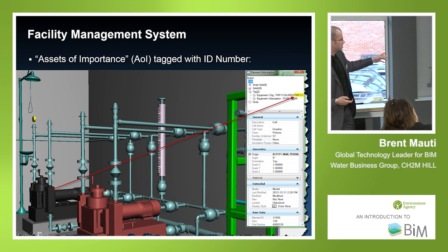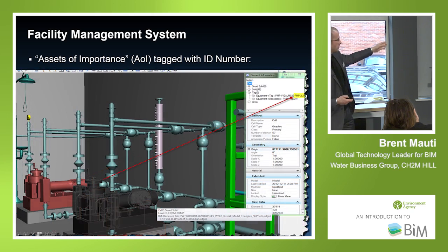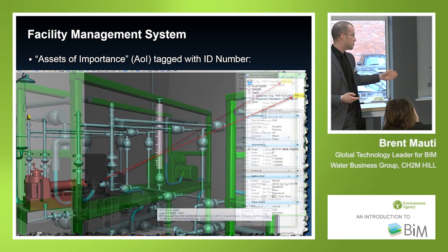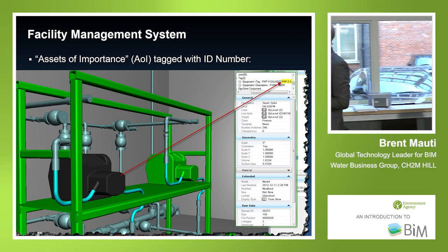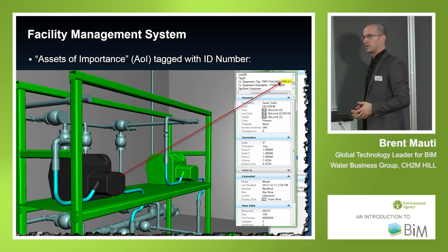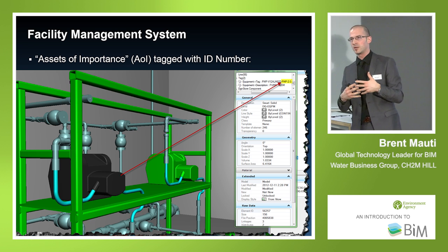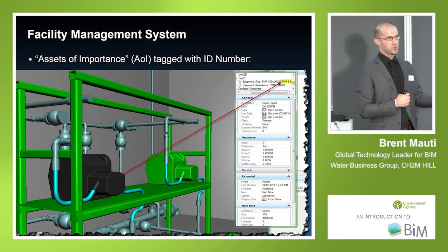These are 3 pumps. And you'll notice they're all appropriately tagged with the nomenclature to match their existing database. And you see the tag wasn't anything robust, but it was 100% matching. That was the link between the BIM and their asset management system.